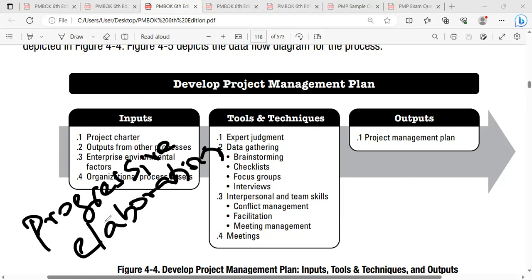What I'm asking everyone is clearly understood, right? Each and every department will be having their own assignment, and each and every department will be having the same deadline to submit their management plans. So before submission, they want to do the changes. The changes can be minor changes, it can be major changes, or they want to edit something, pull something, omit something, or do some minor course corrections. So all these changes they can do on their own without sending this for approval.